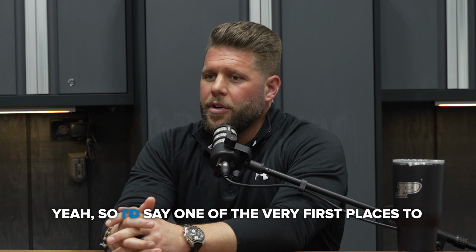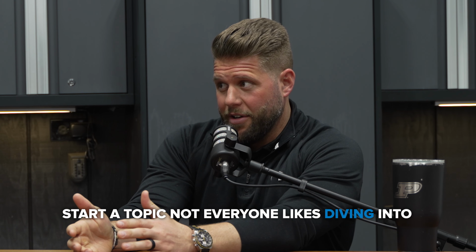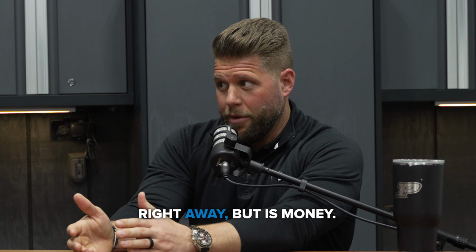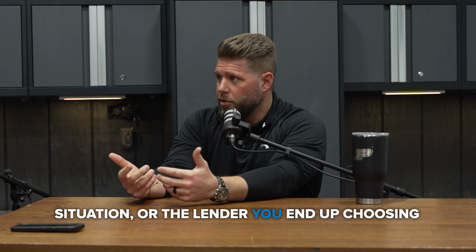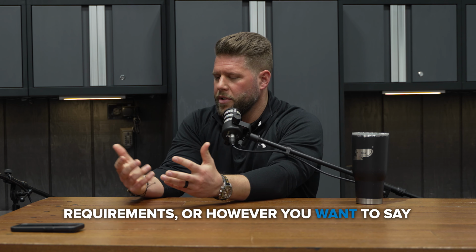Yeah, so I'd say one of the very first places to start, a topic not everyone likes diving into right away, is money, right? So starting with the bank. Your banking situation or the lender you end up choosing may actually have some governing requirements that may impact some of the decisions you make on how you set up your project.